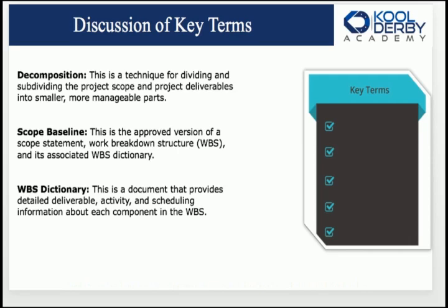Bottom up means you break it down to the lowest common denominator and then you estimate on the way up. You aggregate up. So bottom up estimating, now you know, is associated with the work breakdown structure, and it is a lot more detailed because we break it down, right? We decompose it. A top down WBS, on the other hand, is a little bit more of an overview, and it's definitely not as detailed.